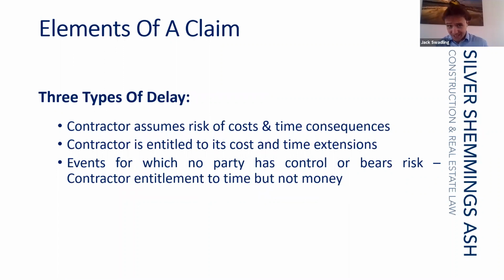And I've highlighted here that there are probably 3 different types of delay on a construction project. There are the ones where the contractor assumes the risk for cost and time consequences of delay. So perhaps this would apply most commonly to matters that cause delay which are within the contractor's control, such as its ability to source labour, its ability to source materials.